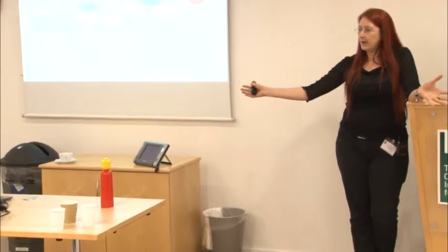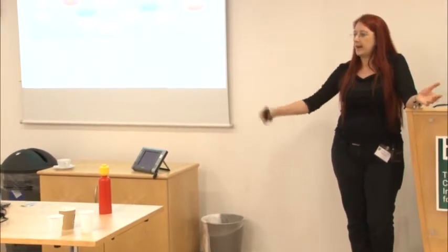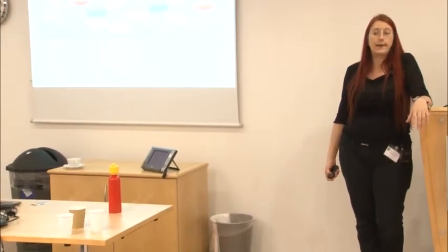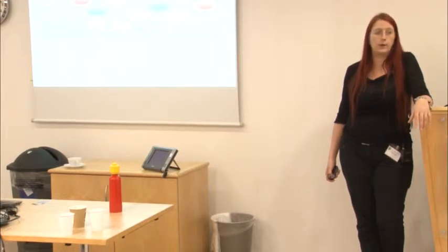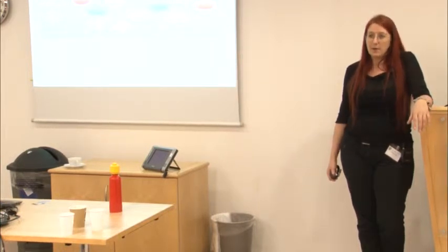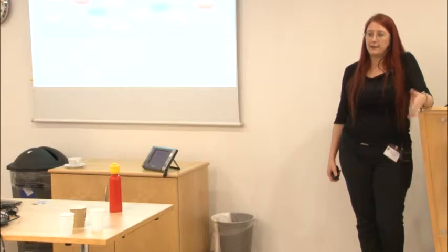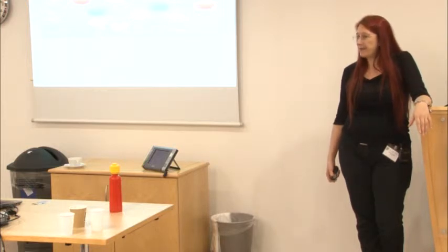Let's rank the rest of them. That took about an hour, and then afterwards I said, okay, double anything with a red dot on, unless you can come up with a good reason why not. And that was enough in these loose estimates for the PM office to be really, really happy. And it turned out that it was actually reasonably accurate.